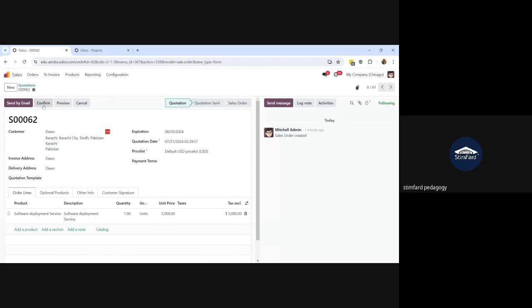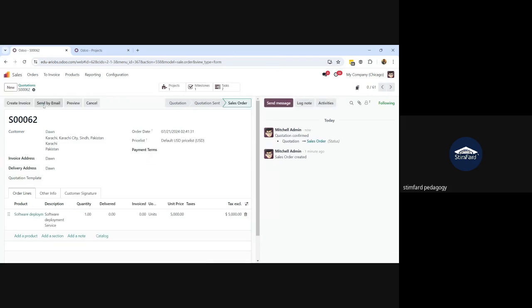Yes, so I'm going to confirm the quotation, and you can see here a new project has been created, with one milestone and the 7 tasks that were created in the project that we selected as a template.